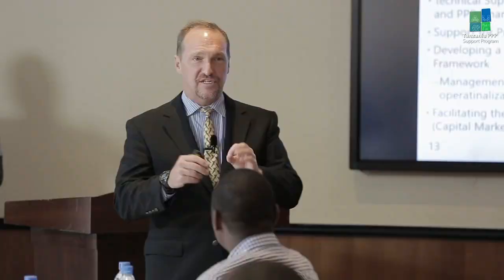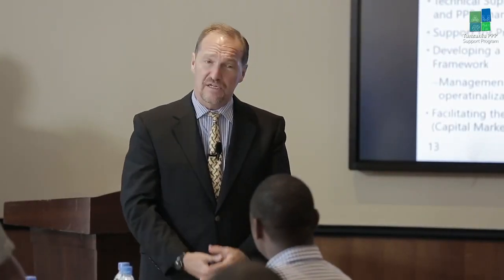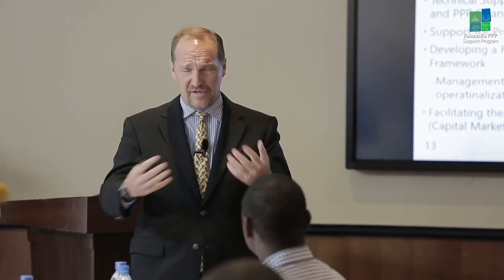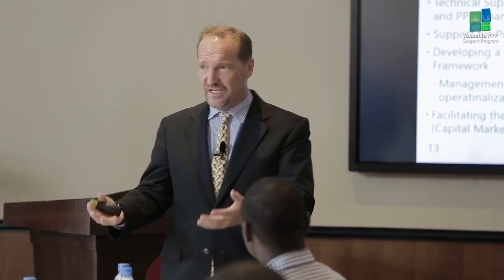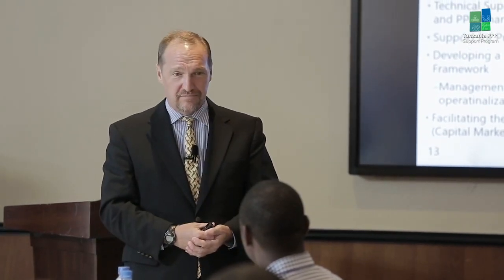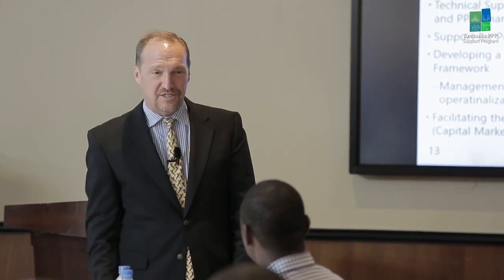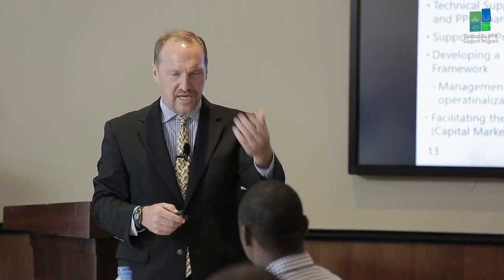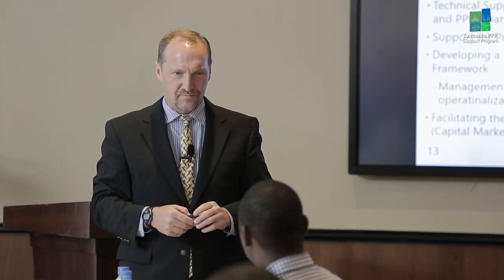You're right. Very often investors will ask for, and especially lenders, almost as many guarantees as they can get. In fact, don't be surprised, I've seen in PPPs that even on the eve of financial closure, they will ask for a full sovereign guarantee. They'll say, you know, we could finance this project tomorrow if you just give a full sovereign guarantee that the government will repay as it is a sovereign guaranteed loan. You don't want that, because then the private partner's capital is not at risk.